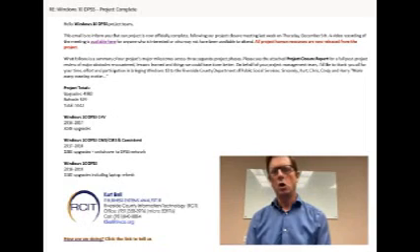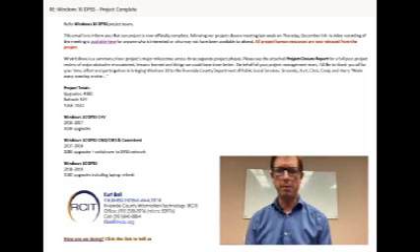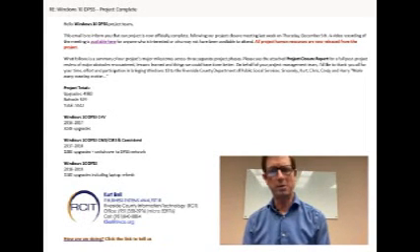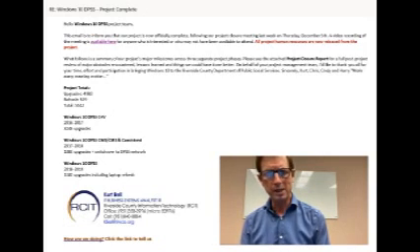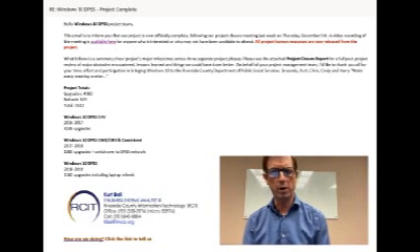Note to self, new best practice to add. Next paragraph. What follows is a summary of our project's major milestones across 3 separate project phases. Please see the attached project closure report for a full post-project review of major obstacles encountered, lessons learned, and things we could have done better. So I did indeed create a report that went along with a PowerPoint presentation, and I gave out the report at the meeting. I included that report as an attachment here. That report actually was in fact signed at the end by the sponsors.